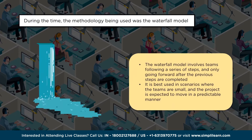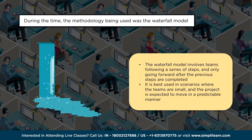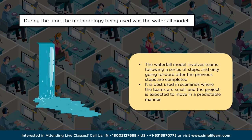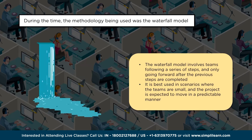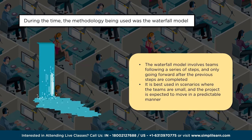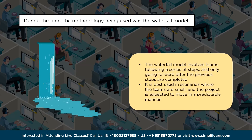In the waterfall methodology, requirements gathering and documentation happens in comprehensive detail first. Once signed off, it moves to design — based on the comprehensive requirements, a detailed design is created considering processes, products, people, and environment. Once implementation starts, if deviations are found, corrections must be made. Because the design is so detailed, deviation possibilities are minimized, but the challenge arises when market dynamics or customer requirements change mid-project.